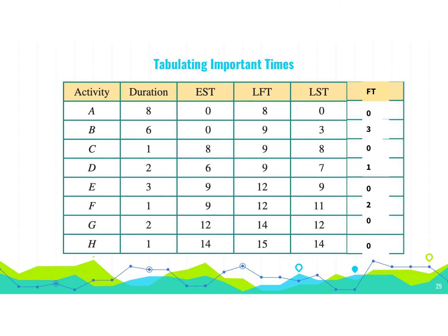When we look at our table here, we can have these earliest starting times and latest finishing times, and that can be used to work out our latest starting times. And once we've done that, in the slide, latest start time minus earliest start time gives us our float time. Now these zeros, just like when we're doing the Hungarian algorithm, they're the important ones. Anything with a 0 in it means that it can't be delayed without affecting the final finish time, which then becomes our critical path, the one that we should follow.